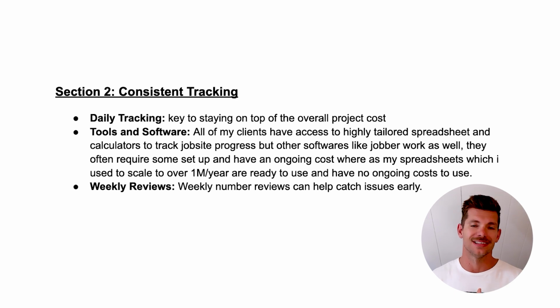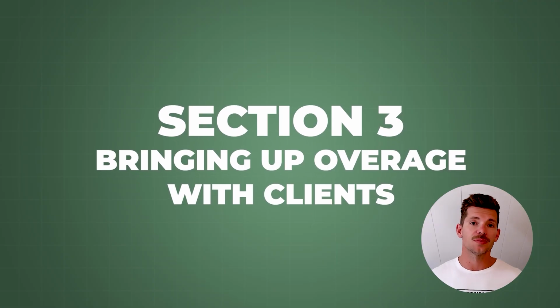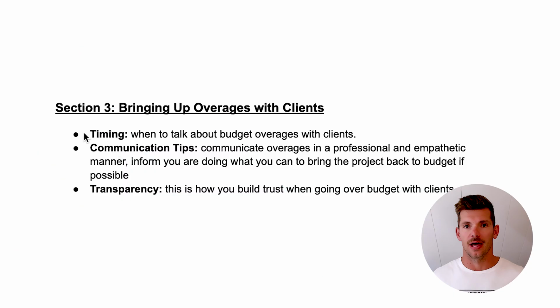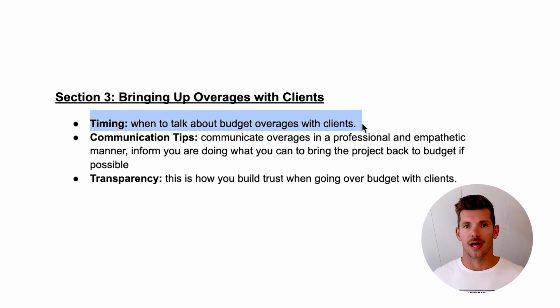Really, really important. And this brings me into section 3, which is bringing up your overages to your clients, all right? So timing, when to talk about the budget overages with the clients, right? Do you want to call them up in the middle of the day and be like, hey, we're over on labor, yada, yada? No, you don't want to do it that way. But when you've given your weekly review or when you've received it from your project manager, if something is up there that you know you're not going to be able to account for, that's when it's time to have that conversation.